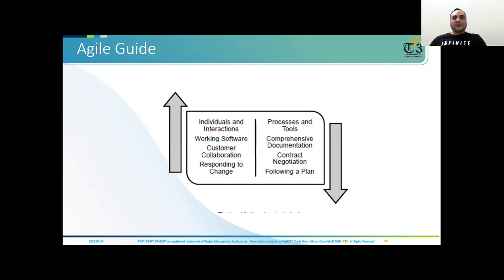To start with, what's the difference between predictive and agile? The first point which I always describe is that the predictive lifecycle is used when information is clear, the scope of work is transparently available, and there is no ambiguity. You have done those projects several times, so you know what steps to do after what steps, you know the risks and the requirements. Everything you have, you compile it, tailor it according to the project size, and then launch the whole plan to be approved by the sponsor.